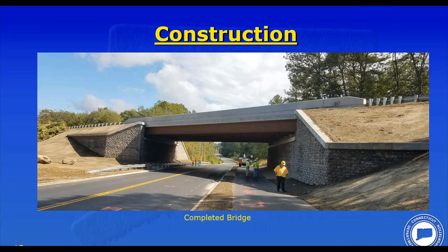Yeah, I'll throw another one in. The one complaint we had on one early SPMT project was, as Tim mentioned, the specifications. It was a disincentive specification that basically said that if Monday morning the road was not open, there was a certain value per 15-minute increment, and it didn't have an upset limit. So it basically said, if you went to like 2 o'clock in the afternoon on a Monday, it exceeded the cost of the project. So the contractors complained, rightfully so, that they couldn't get bonding for the project because